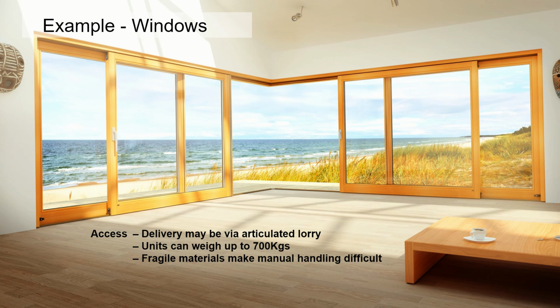So getting it to a remote location might cost extra money. It might be more complex. The contractor might add in a fee or a cost within there for the risk of doing so. So thinking about that as you design the building is one way that you can minimize or mitigate against those issues.